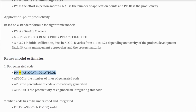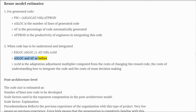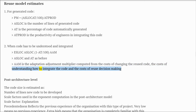Reuse model estimates: for generated code, PM = (ASLOC × AT) / (100 × ATPROD), where ASLOC is the number of lines of generated code, AT is the percentage of code automatically generated, and ATPROD is the productivity of engineers integrating this code. When code has to be understood and integrated: PM = ASLOC × (1 - AT/100) × AAM, where AAM is the adaptation adjustment multiplier computed from the costs of changing reused code, understanding how to integrate the code, and reuse decision-making.